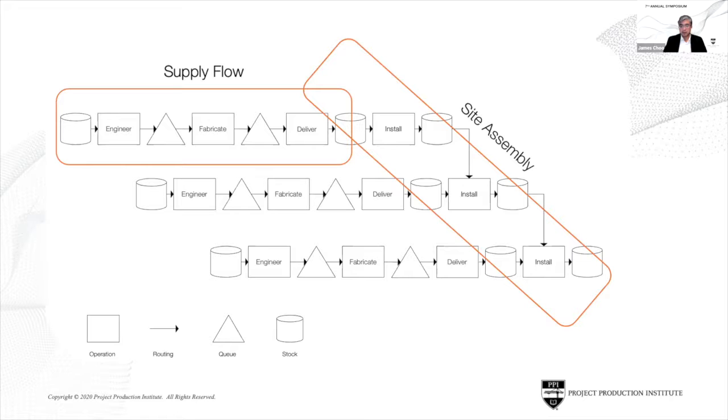So that has to come into play. Otherwise, we might end up creating stuff inefficiently, with cash tied up at these stock points between delivery and installation, right? As Todd talked about as an example in the previous session, someone spent time optimizing how they drill wells, and that increased the amount of cash inventory that sat here, and tied up a bunch of cash that they didn't need to.